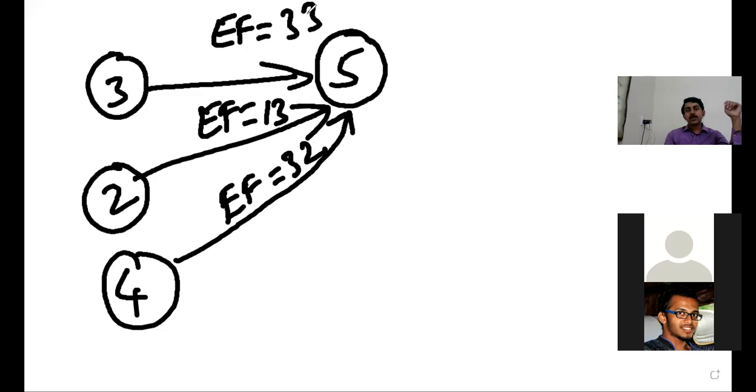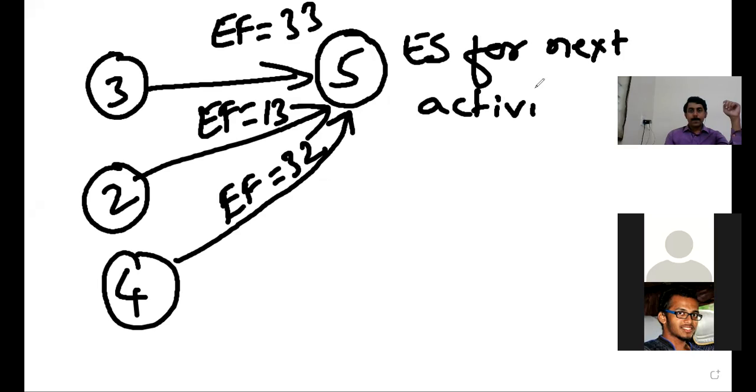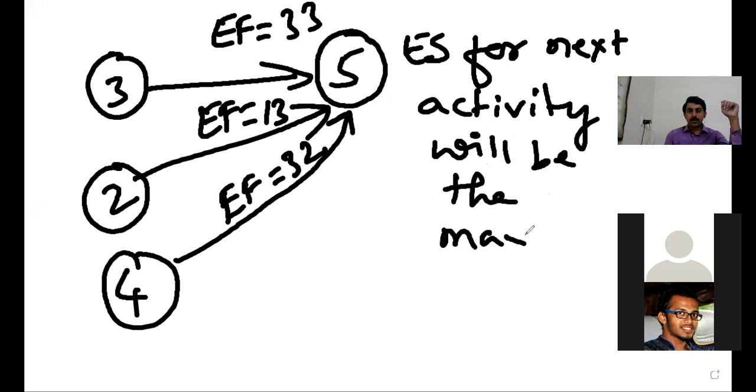Is it right? So the early start for the next activity will be the maximum of the early finish.